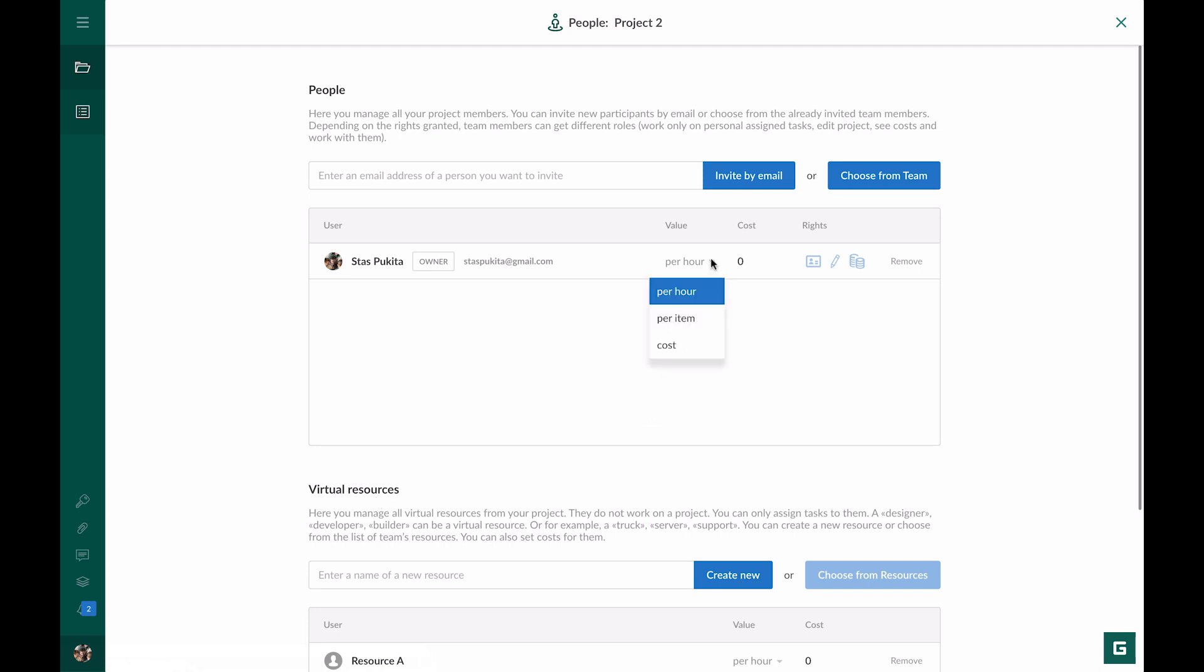A labor resource is calculated per hour, a material resource per item. For a resource with a fixed cost, you can set any cost not taking into consideration hours and items. So let's set the cost per hour for our resource and assign a task. By default, the values are set per hour. For example, the working hour costs $5.